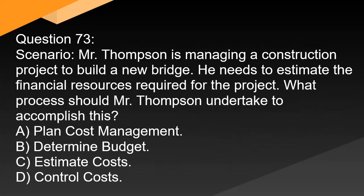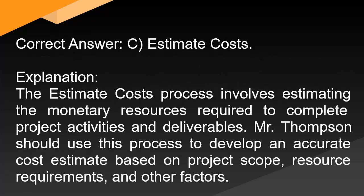Question 73: Mr. Thompson is managing a construction project to build a new bridge. He needs to estimate the financial resources required for the project. What process should Mr. Thompson undertake? A. Plan cost management. B. Determine budget. C. Estimate costs. D. Control costs. Correct answer: C. Estimate costs. Explanation: The estimate costs process involves estimating the monetary resources required to complete project activities and deliverables. Mr. Thompson should use this process to develop an accurate cost estimate based on project scope, resource requirements, and other factors.